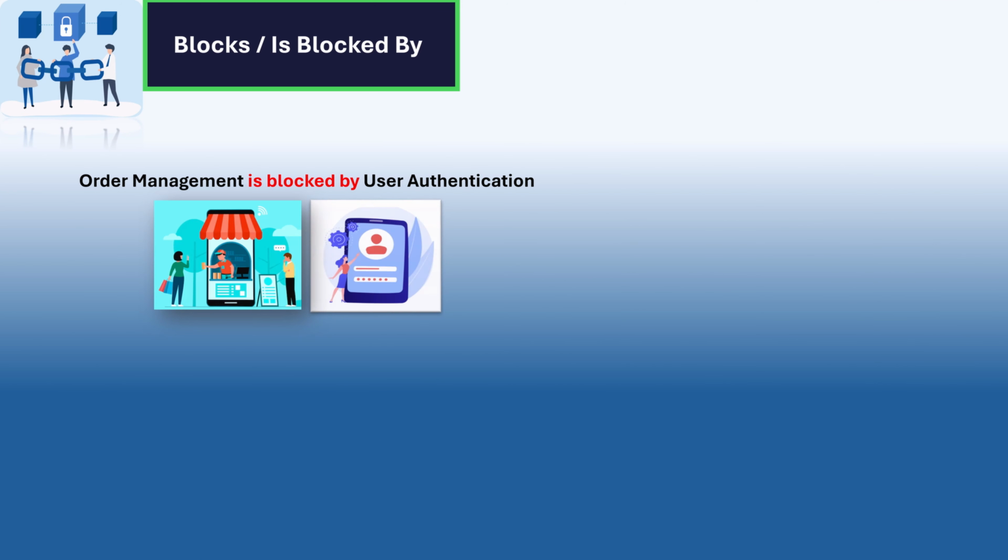We are going to see how blocking relationships between stories work in Jira Free Cloud using our food delivery app. We will create a sprint, add all the epics and stories, and see how dependencies affect what we can start and plan. So let's link stories with the blockers. Blockers define dependencies, meaning one story cannot start until another is completed. For example, a story under order management is blocked by a story under user authentication. You can't place an order without a logged in user.